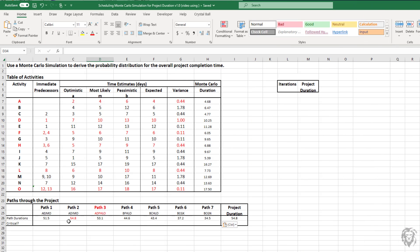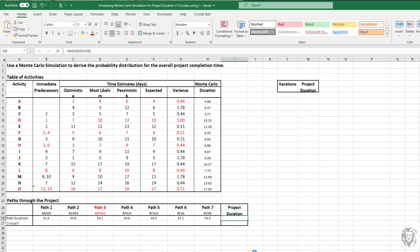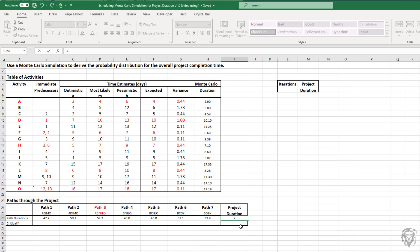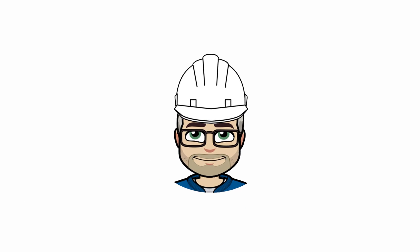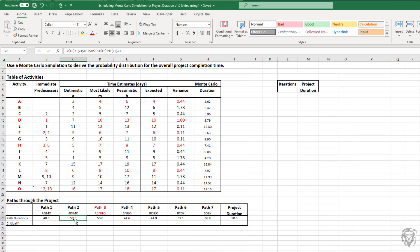We've got them all put in. We're calculating our path durations for each of our paths. Our project duration is just going to be the maximum of any of our path durations. So it's equal to the maximum of any path duration. I also added a little bit of conditional formatting. You see the 50.6 on path two is showing up as critical. This is locked in on path three because that's our analytical critical path. But in this instance, we see that path three isn't critical, that path two ended up being longer. We're using conditional formatting to indicate that.